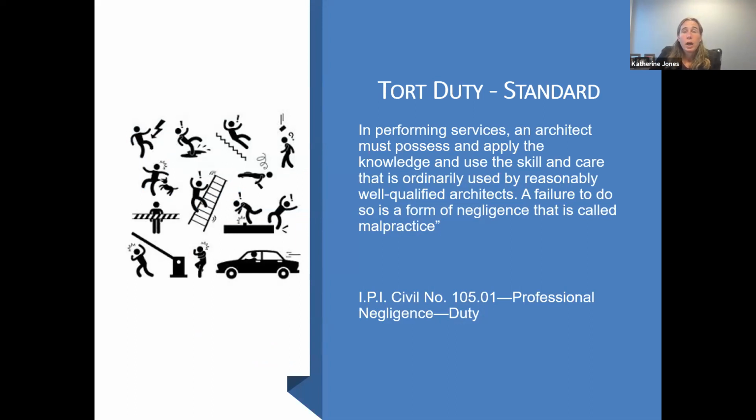In Illinois, if you are defending a lawsuit for any reason, what Illinois law specifically says, and this is what a jury would eventually be told if you were on trial, is that the standard of care is, in performing services, an architect or engineer must possess and apply the knowledge and use the skill and care that is ordinarily used by reasonably well-qualified architects or engineers.